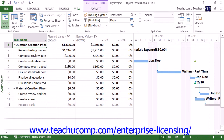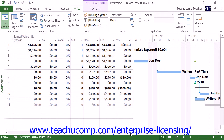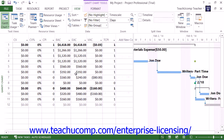As with the Earned Value Schedule Indicators, you will see the Planned Value and Earned Value columns. Also within this view, you will find the Cost Variance column, which is the difference between the EV and the actual cost of work performed as of the status date; the Cost Variance Percentage, which is the ratio of cost variance to PV expressed as a percentage; and the Cost Performance Index, or CPI, which shows how many cents' worth of work was accomplished for each dollar's worth of work that was spent.